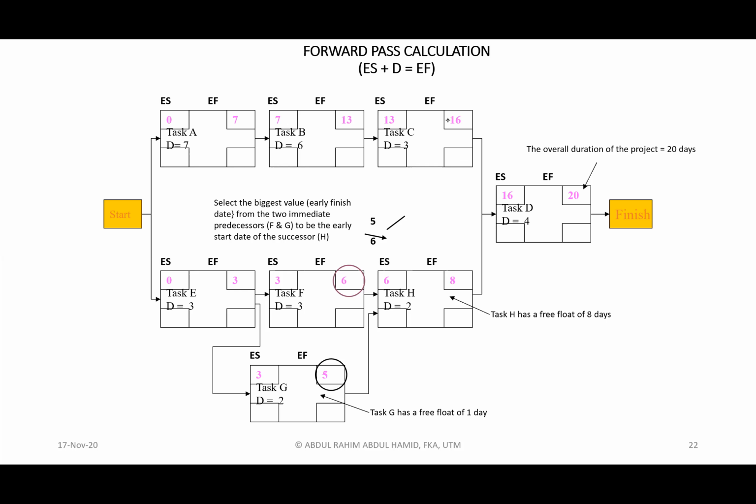Okay, now after you completed the box, then we are going to start doing the calculation inside the box. So remember, start is the milestone activity. This one is also milestone. Milestone indicates an important event with 0 duration, normally being used at the beginning or ending of a network diagram only.